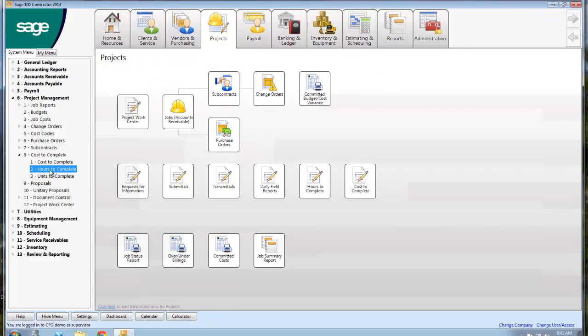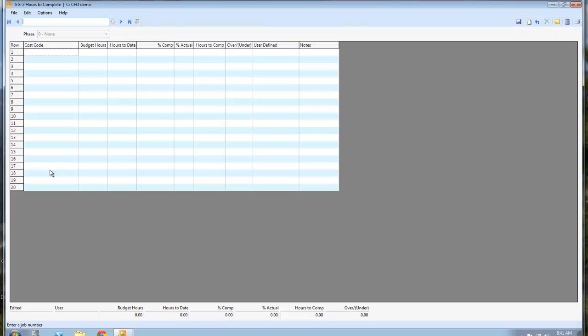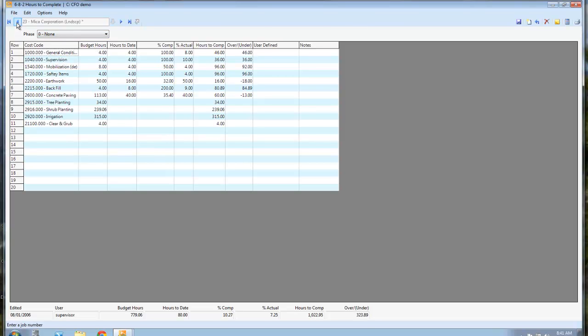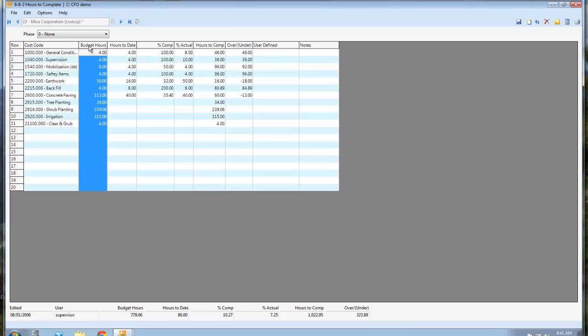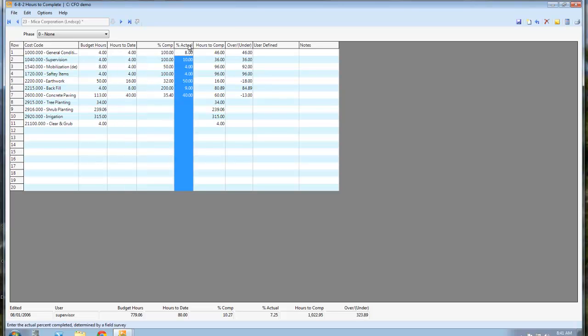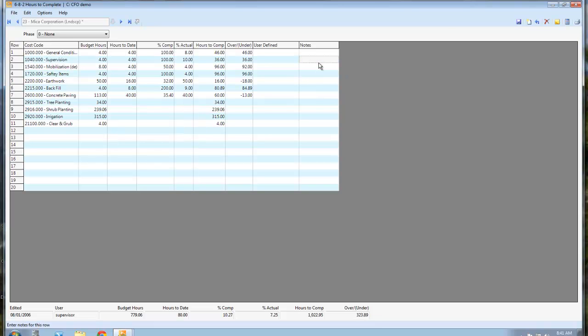The other one that may be really useful for you is this one. Same thing. I took the dollars out, and so I'm just looking at budgeted hours, hours to date that came through the payroll, what percent am I actually complete, and it's going to compute my hours to finish and whether I'm going to be over or under based on my budget. So again, lots of information going on in here. And a note field can just say, estimator screwed this up, or egress is more difficult than we anticipated. But you can start putting notes in here so people can see those.